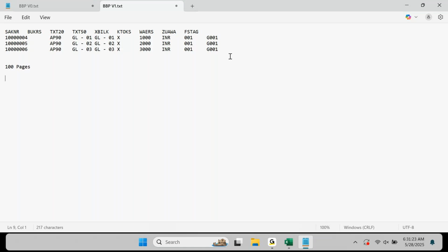No, sir, only the corrections. Meaning, in the revised document, in version 1, you also need to mention changes wherever they are made. You need to highlight specifically where exactly changes are made.